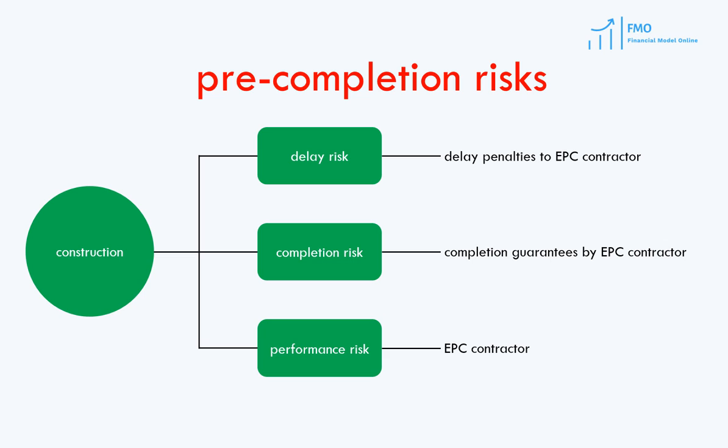Any shortfalls in performance will be penalized. So essentially, at the construction stage, the EPC contractor takes the risk under a turnkey EPC contract.